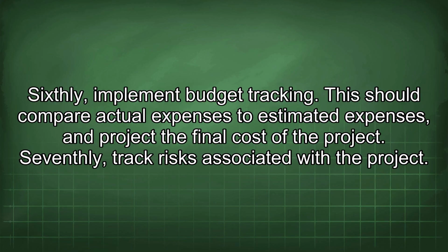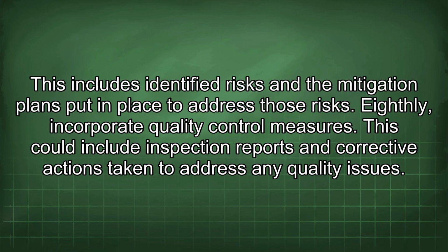Seventhly, track risks associated with the project. This includes identified risks and the mitigation plans put in place to address those risks. Eighthly, incorporate quality control measures. This could include inspection reports and corrective actions taken to address any quality issues.